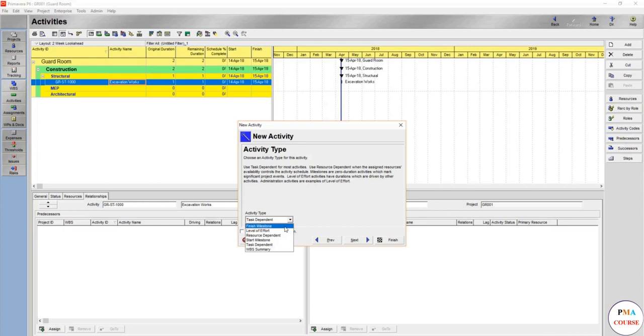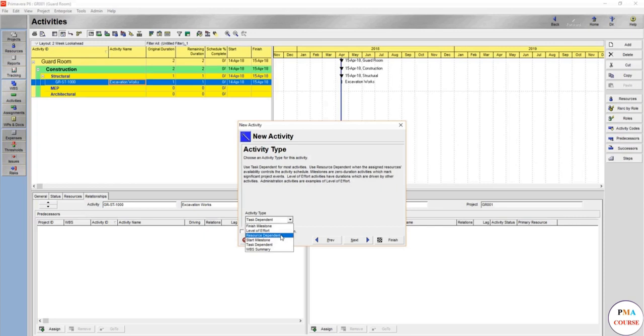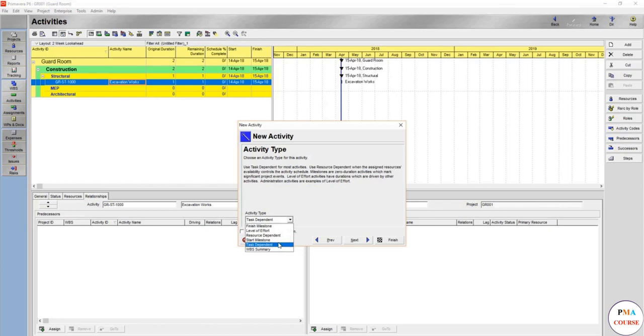It's either finish milestone, level of effort - finish milestone shows just let's say the project finish. Level of effort shows that for example attendance, that no resources are assigned or anything but just showing attendance for activity. Resource dependent - that means that the duration is dependent on the resources, not vice versa. This means that you are going to use the duration dependent on the resources you have limited resources, and according to such limited resources, what's the duration?